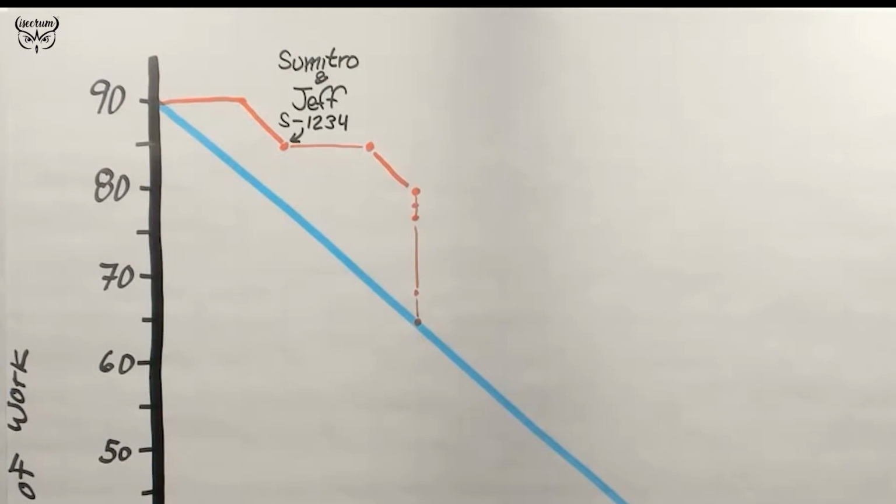So they are going to mark this on the day 3 line. Okay, so at the end of the day on day 2, it looks like we have 2 2-point stories getting done, an 8-point story getting done, and another 3-point story getting done. Let's take a look at these.